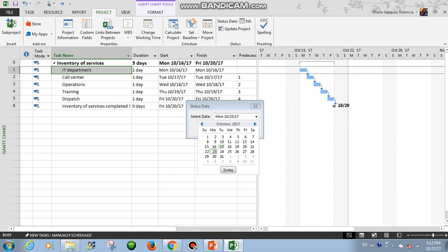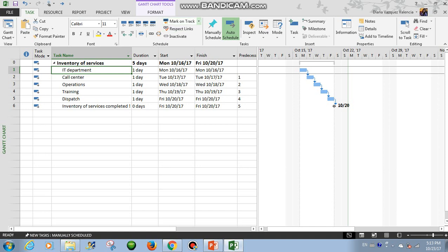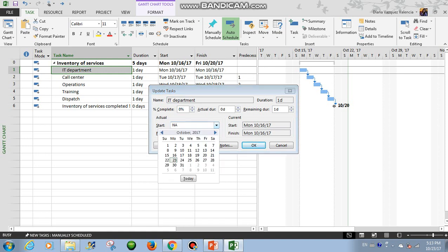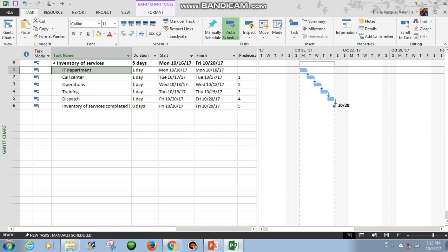So we will start our report on Tuesday, 1 day after the start of the project. So come here into task and then go in mark on track and update task. Okay, so let's say that on Monday we didn't finish 100%. Let's say that we did 50% of what we planned to do before. So as you can see here, the progress bar is showing only 50%. And let's see the report.